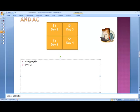Now the next thing we need to think about is the actual. Let me just let you know that plan value always is there. You don't have to have started the project for there to be a plan value. You don't have to have done any work. You're just saying at the end of day one, we would have spent one dollar and we would have gotten that quadrant done.